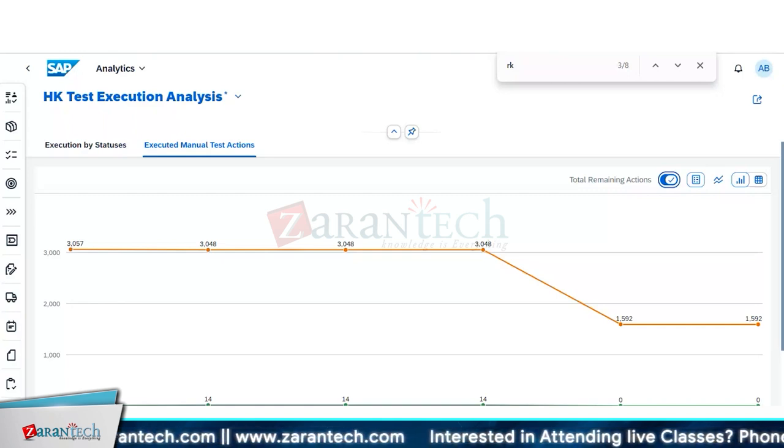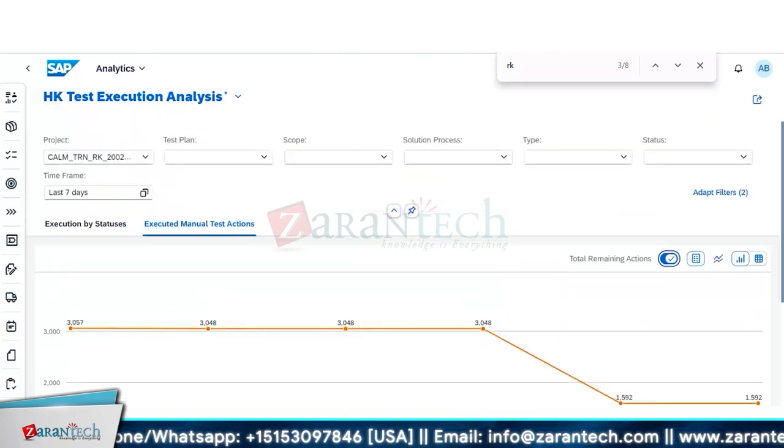Obviously, it's not that you have to do all of this stuff, but the whole activity is broken down into those steps. So it gives you that better view, and even in reporting, in most projects they have this metric: total test steps to be executed, total test steps executed, and remaining. So this is another good metric, and a very sought after one. You must have seen it in your project. I think so.